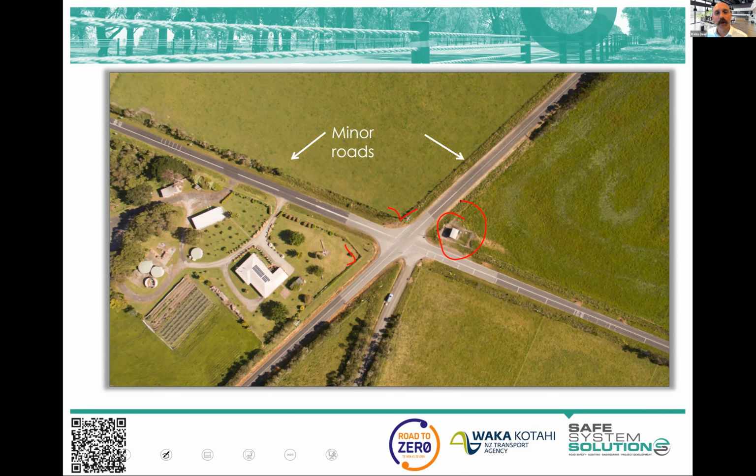So the region's like, okay, well, we'd love a roundabout here. And they look to Part 4B and they design their roundabout up, and it's got reverse curves on the approach, big reverse curves and this big roundabout area. They've got to relocate that. They've got to buy up all of this land and buy this land and buy part of this. And they don't like it because it's taken up their front garden. And lots of the usual challenges you get, and service removal, and the price tag comes in near $10 million or something like that. And they go, we can't be doing this.